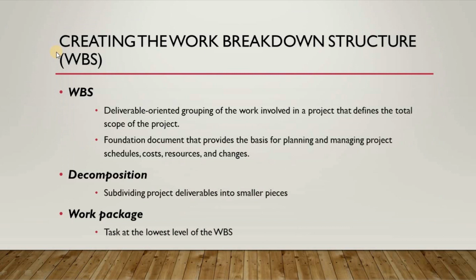Creating the work breakdown structure. Work breakdown structure: a deliverable-oriented grouping of the work involved in a project that defines the total scope of the project. It is a foundation document that provides the basis for planning and managing project schedules, costs, resources, and changes. A project is characterized by time-limited activities and is assigned fixed time frames and costs. When it is finished, a project must fulfill the stakeholder needs it was designed to address.